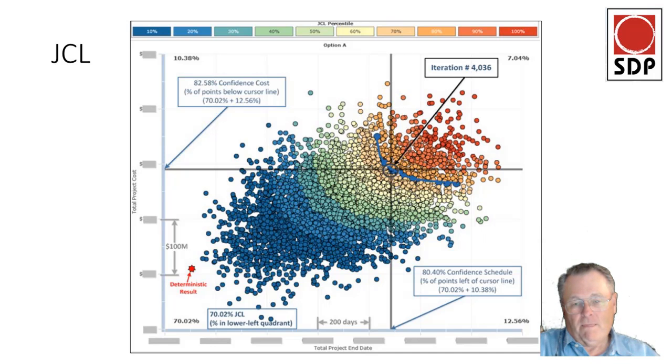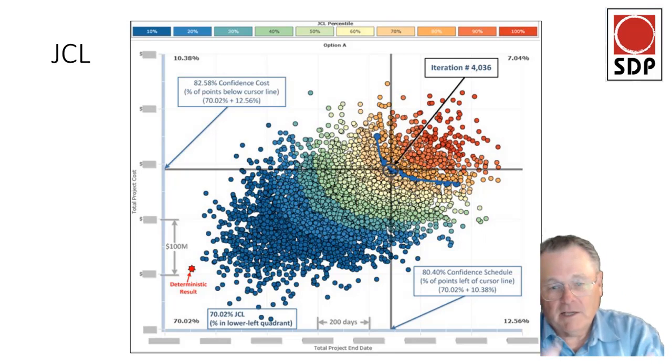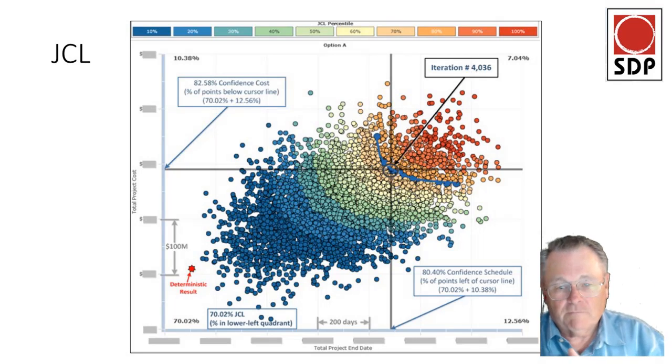No, there's nothing being equalized. Those are possible outcomes, possible results that will fall within a 70%. The left-hand indicator there, the 70%, remains constant. Any number where those two crosshairs hit any area on that curve, the 70% should remain in place. Okay, so if I start to adjust these lines, this percentage down here changes, and you're saying if I put the crosshairs at, let's say, this point up here, it would also read 70%. And thereabouts, yeah, more or less. Okay. So that's what's being held constant as I build this so-called efficient frontier.